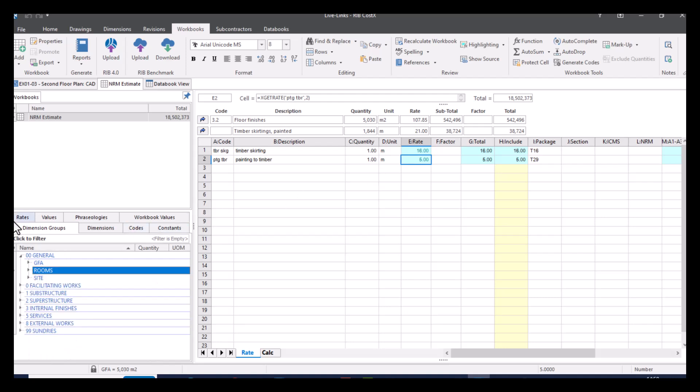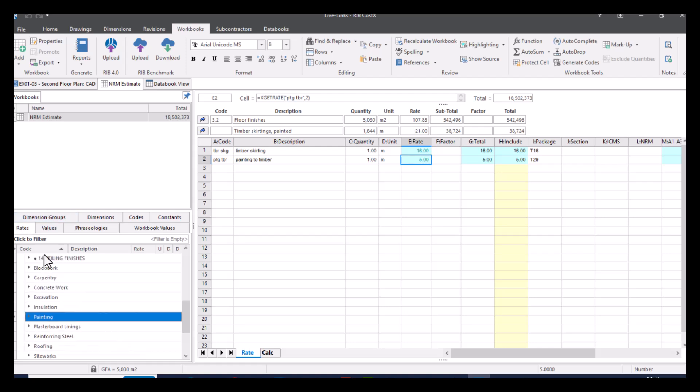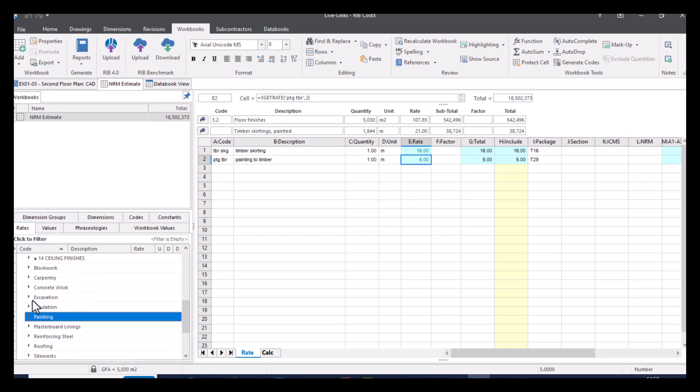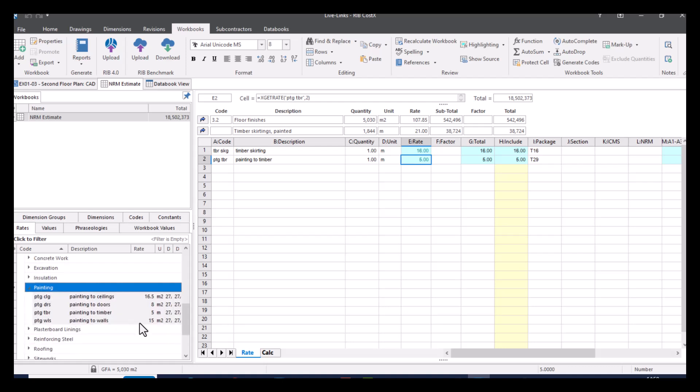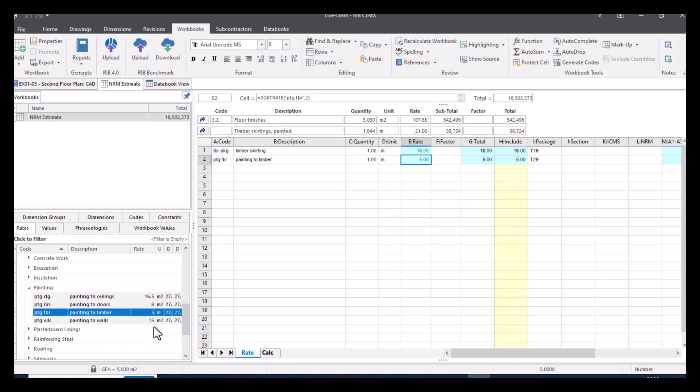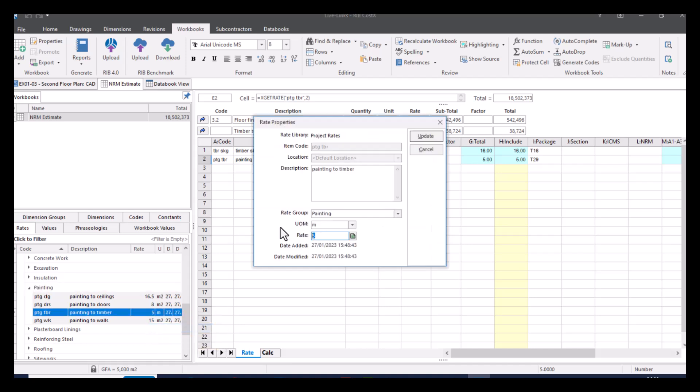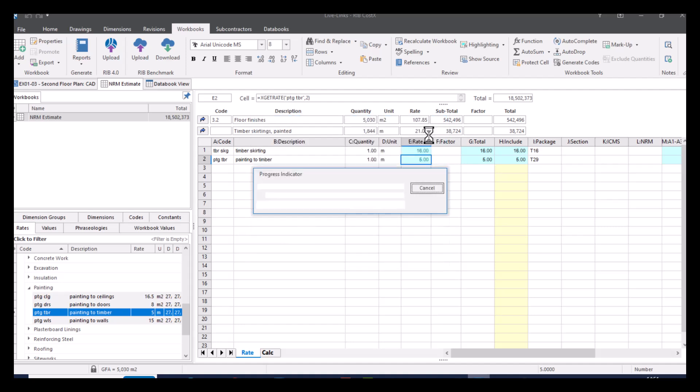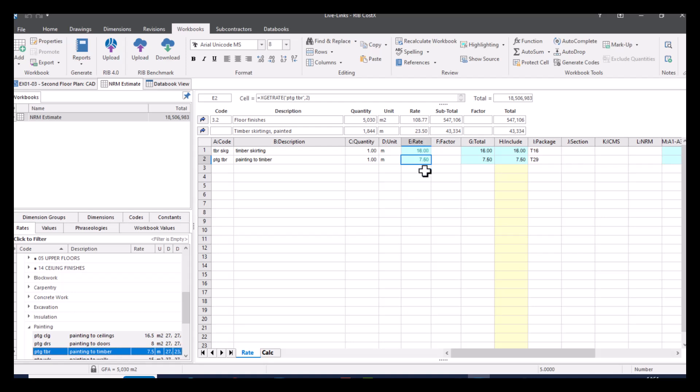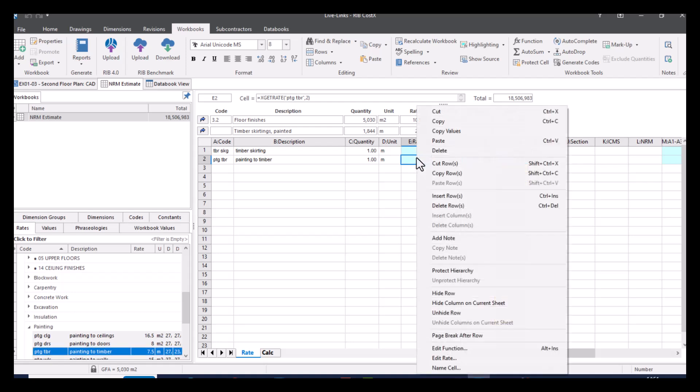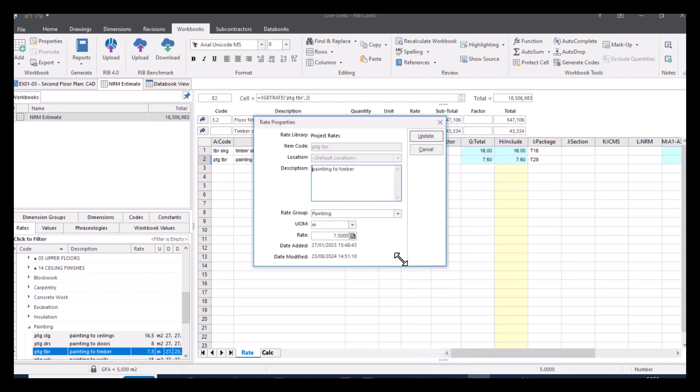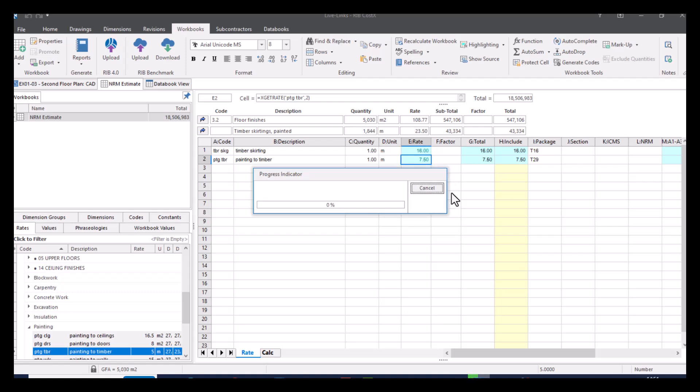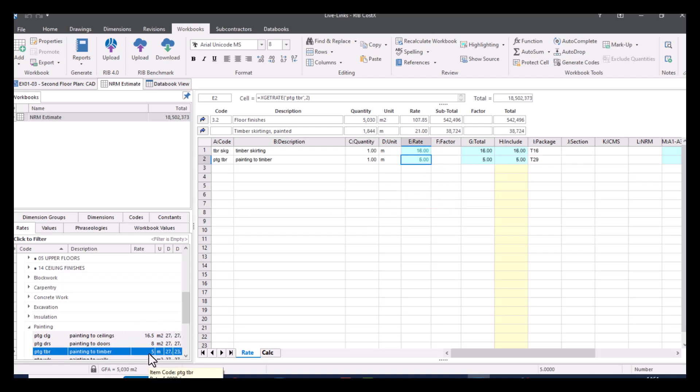So if we were to find that specific rate, we've gone into our rate libraries, project rates. Let's go into the painting one. We can see that it's £5 per metre. If I go into here and edit this rate, then if I was to change it to £7.50 and then update, we can see there that that changed as well. So I didn't have to manually go in and change everywhere on this workbook that contains that rate. It's automatically done it for me. Again, you can right click here, edit this rate and then go back, change it back to the £5.00, update there and it's updated your rate library over here as well. So the benefit of the live link is just the speed in which it does everything for you. You're not having to manually go back and adjust everything. It is all updated automatically.